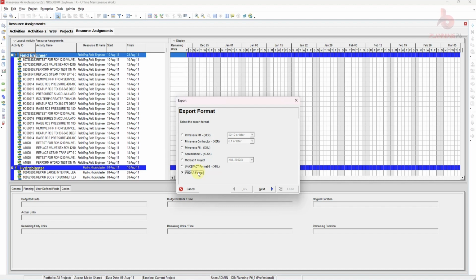To copy the range of cells, use the context sensitive right click menu or use the shortcuts: Shift Control C to copy range, and Shift Control V to paste range. Only the values in the cells are copied and pasted. So it is possible to copy and paste between cells with different units of measure. When you paste the range of cells, the data is only pasted into the editable cells. So you can now use this.